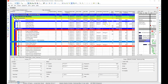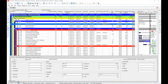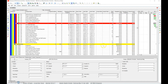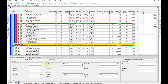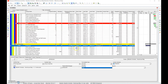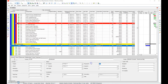Going through the calculations: 100% of $17,500 is an earned value of $17,500 — straightforward. Going to another activity that is 50% complete before the data date — 50% of $20,000 is $10,000. If it shows Duration Percent Complete instead of a percentage, go back to the General tab and change it to Physical Percent Complete, then make sure it's 50%. Now 50% of $20,000 shows $10,000. Use these auto-calculate functions, and make sure you're using Physical Percent Complete, not Duration Percent Complete — I can't say that enough.